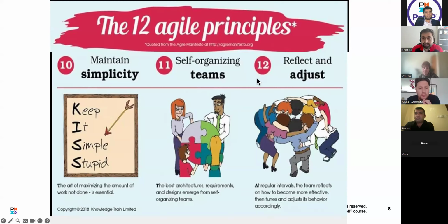And as Mr. Azim was saying, one of the key principles of Agile is that at the end of every iteration, which is also called a sprint, the team sits together and discusses how we can improve the next sprint. That is called a retrospective. Retrospective is an important thing because you got a question on it. How can things be improved? Retrospective is very critical for Agile.